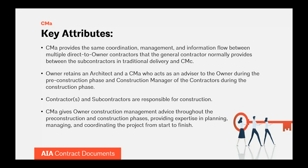There are a number of wrinkles that often cause some head-scratching with CMA delivery. First, under CMA the construction manager is retained at the start of the project, serving as a direct-to-owner consultant and advisor — somewhat similar to the architect. During the pre-construction phase, the CMA provides many of the same services as a CMC. Once construction begins, the CMA assumes many of the general contractor's roles to manage, supervise, and coordinate the multiple contractors — but without the risk or liability for providing the construction itself.